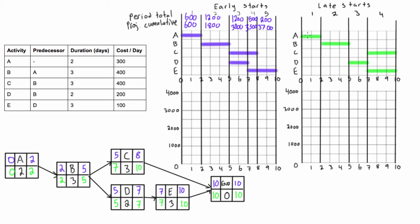For the late starts, period one is exactly the same — period total $600, cumulative $600. Period two is also the same — $1,200 period total, cumulative $1,800. Now period three goes from 5 to 7 with only activity D at $200 a day for 2 days, running $400 and bringing the project cumulative to $2,200. Period four has activities C and E both running — $400 plus $100 is $500 a day for 3 days — period total $1,500. Adding that to $2,200 gives us the same final project cumulative of $3,700.